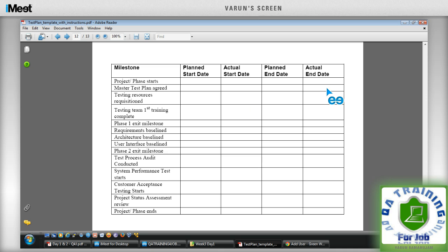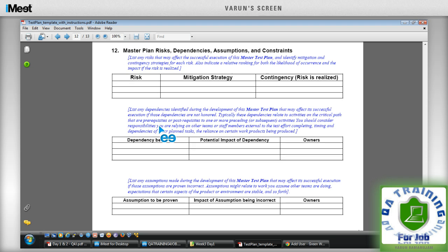Milestones means each level of testing that we go through in the process, with dates and times, like what comes after another. If we have to track, we will do that. The test lead will look at this document and figure out if one tester is doing some content and another tester other content. He'll put a milestone and a deadline for each one of them. Okay, tester A, you finish this in 2 weeks. Tester B, finish this in 3 weeks. Like that, you will assign the task based on the number of tasks. Those are all milestones. Now, risk and mitigation strategy.